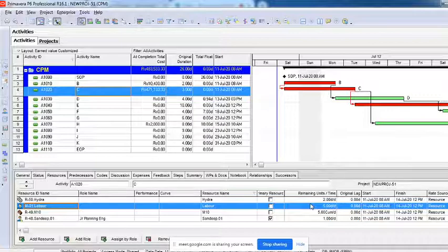Understanding? Right now it is 50, 50, 50. Per day it is 50. But I am not sure that I'll get 50 per day. So probably someday I might have 70 or 80 hours work done, and someday I might have only 30 or 40 hours work done, or someday I might have only 10 hours work done, based upon the availability of the resources later on. And it will directly affect, if I could not finish 150 hours in 3 days, then it will directly affect my duration of the project, if that activity is critical, of course, because in this example it is critical. So I'm telling it will affect. So how do I plan for that?